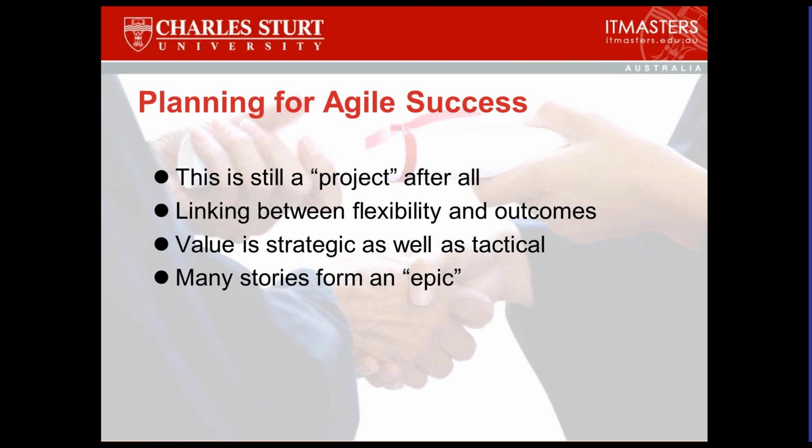There might be a whole ton of user stories or features that are demanded and expected to give the salespeople information about the history of expenditure of their customers in a variety of ways from a variety of means and perspectives. Now, all of the user stories that contribute towards that major chunk of functionality might be called an epic. And usually we'll want to do that epic in a largely organized and contiguous fashion, where possible, where appropriate. That means that what we don't do is say, well, we're going to do a whole bunch of this reporting, and then 6 months later, with another dozen iterations in between, we're going to work on the other half of it. Yeah, we could, but doing it contiguously is usually a lot more effective.